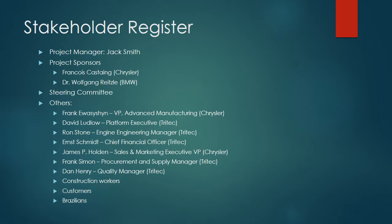The stakeholder register: the key player is the project manager, Jack Smith. He was basically mandated to start a business, quite a large endeavor. The project sponsors were Francois Castaing from Chrysler and Dr. Wolfgang Reitzel from BMW. There was the steering committee I mentioned, which had both project sponsors as well as two other members from the BMW team and two other members from Chrysler, totaling six in total.